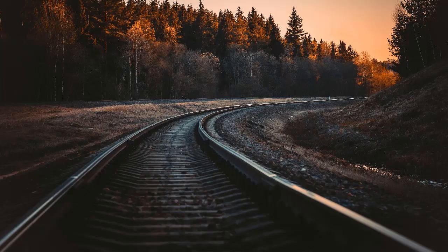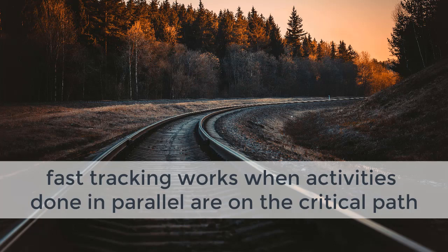Oh, one other thing about fast tracking. You're standing on the track of the fast approaching train, so you are on the critical path, right? So fast tracking reduces the overall schedule only if activities are on the critical path.